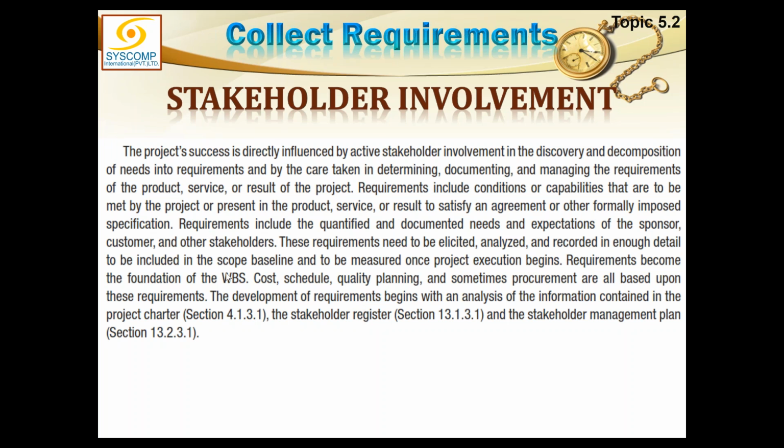Requirements become the foundation of the WBS. Cost, schedule, quality planning, and sometimes procurement are all based upon these requirements. All other management knowledge areas will be dependent on the scope. Once you have established the scope, you can start doing everything else. You can start working on the procurement, you can start working on the scheduling, costing, everything you can start doing only after the scope has been established, because until and unless a proper scope is established, how can you do anything else in the project?